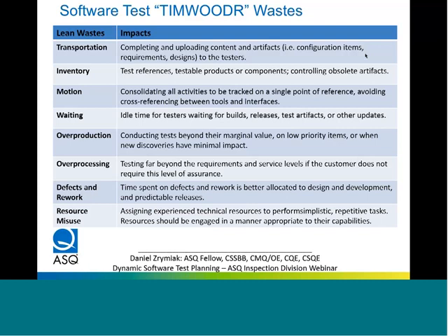2 items: overproduction and overprocessing. So even though it's important to have thorough software verification, validation, software inspections, there is an economic value. Once something is discovered, for example, once you've discovered that a particular build or feature is defective, there's minimal value for reinforcing that by repeating the same set of tests.